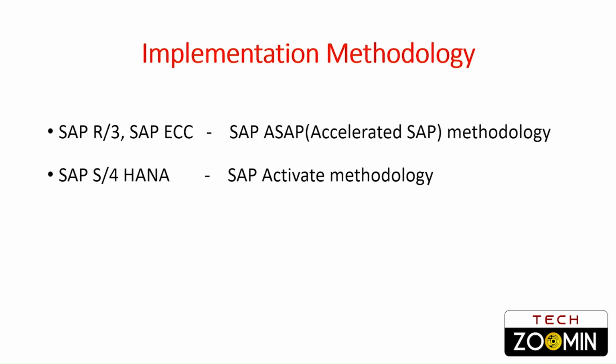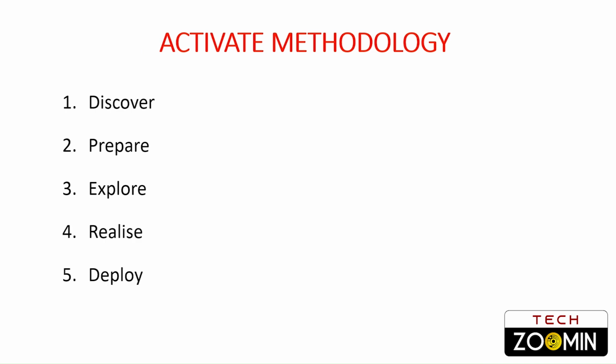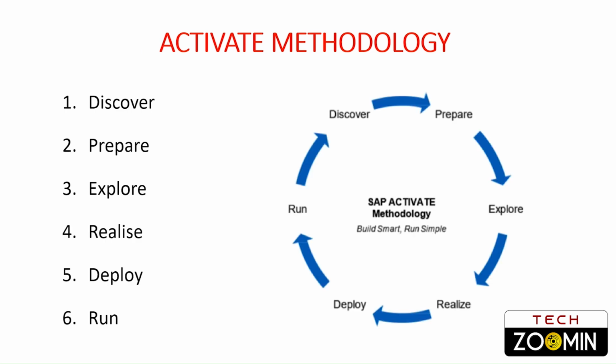So for SAP S4HANA projects, the recommended methodology is the SAP Activate methodology. Let me first of all show all the SAP Activate methodology phases. It starts with the discover phase. After that, the prepare phase. After the prepare phase, we have explore. Then we have realization, then deploy, and finally we have run. So this is the complete cycle of the Activate methodology phases. And in Activate methodology, you will find the activities are the same as in the ASAP methodology. Okay, so let's discuss one by one.